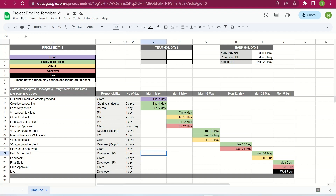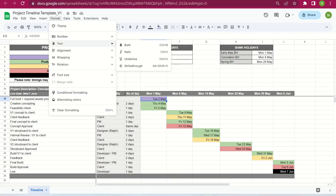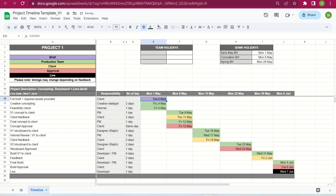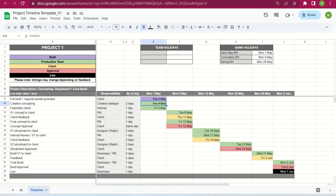Another thing I love to do as the project progresses is to add a strikethrough to each completed task. You can go to Format > Text > Strike. Once the client has shared the briefing assets, pop a strikethrough on that task so you know the date has been hit. I like to strikethrough the actual date. As you go through the project life cycle you can strike through each completed task, so when you or anyone else checks the timeline they can immediately see where the project is at — especially useful on a Monday morning when you need to quickly reorient yourself.